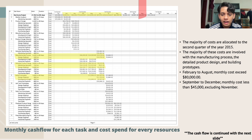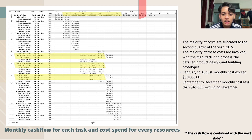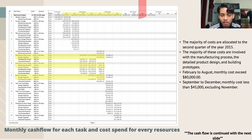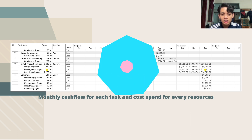From the monthly cash flow for each task and cost spent per resource, the majority of costs are allocated to the second quarter of 2015, mostly involving the manufacturing process, detailed product design, and building prototypes. From February to August, monthly cost exceeds $80,000, and from September to December the monthly cost decreases to less than $45,000, excluding November.